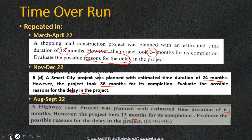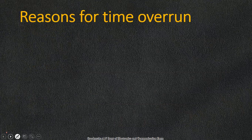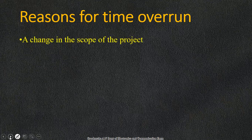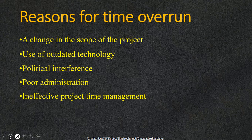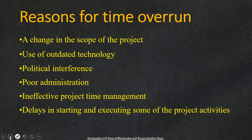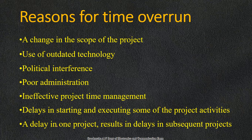Now let us look at the answer. We need to write the reasons for time overrun. The first reason is change in scope of the project, use of outdated technology, political interference, poor administration, ineffective project time management, delay in starting and executing project activities, and delay in one project resulting in delay in subsequent projects.